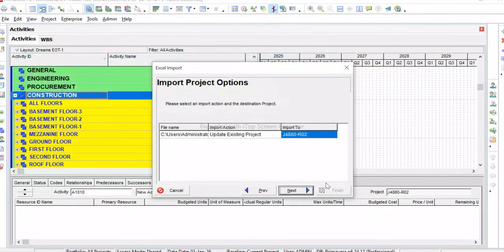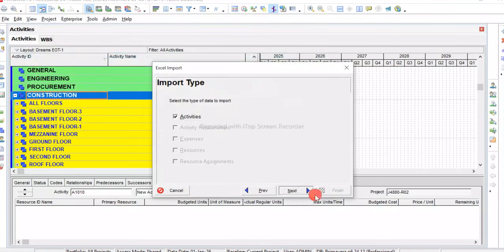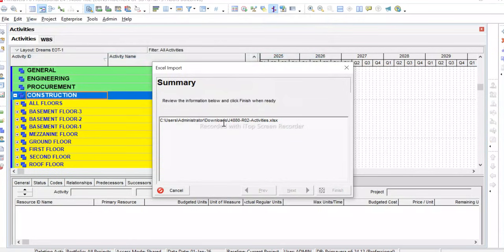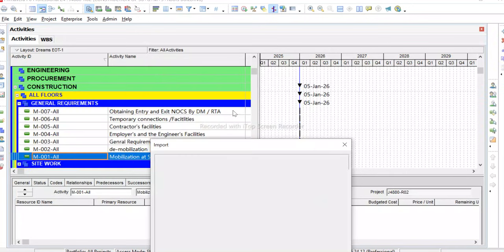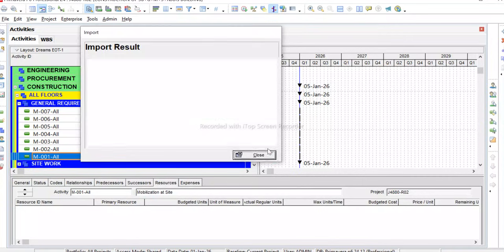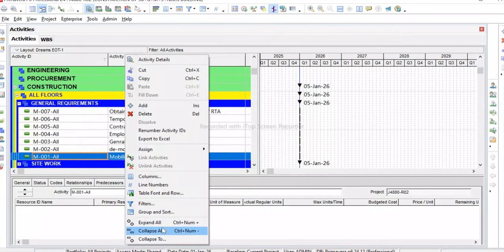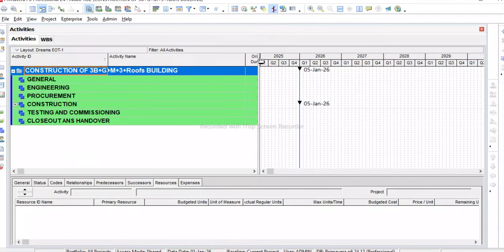It will not be limited to some WBS or activities, it will be multiplying, so it will create a huge headache for you. My advice is to first make sure that you have created all the WBS paths very accurately at single WBS levels, from level 2 to whatever the last level is, and then combine those levels into a single sheet.